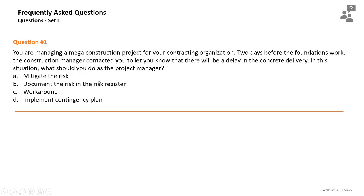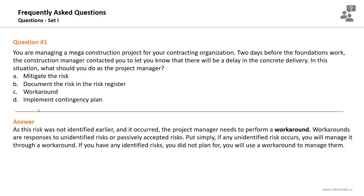To think about this situation: you received a call informing you of a delay in concrete delivery. You cannot mitigate this risk — it was not identified earlier. It's an issue, not a risk. There is no probability of occurrence; the delay already happened. You cannot document it in the risk register either. If the construction manager had said there might be a probability of delay, the answer would be to document it in the risk register. But since the delay happened, you need to conduct a workaround. You cannot implement a contingency plan because it was not planned for earlier.